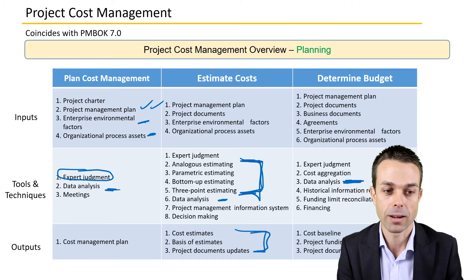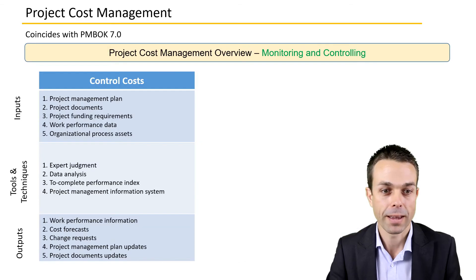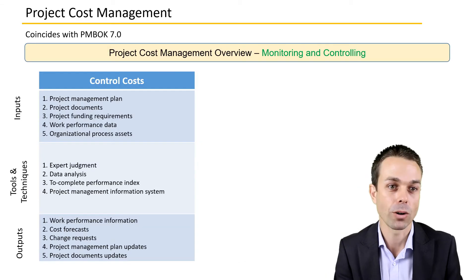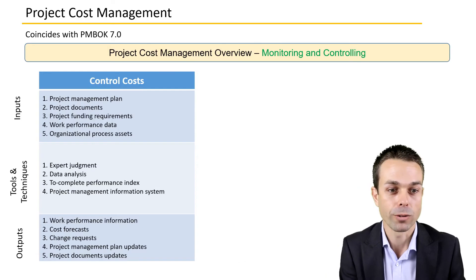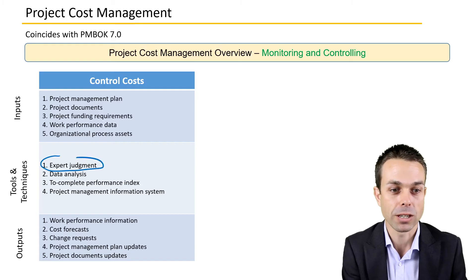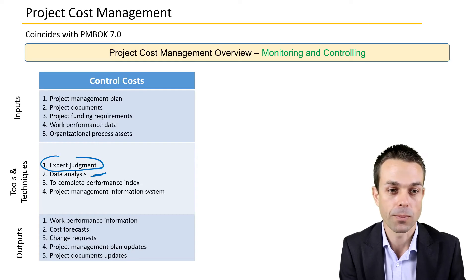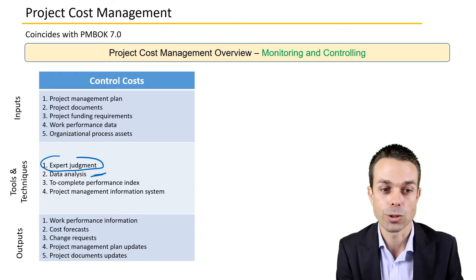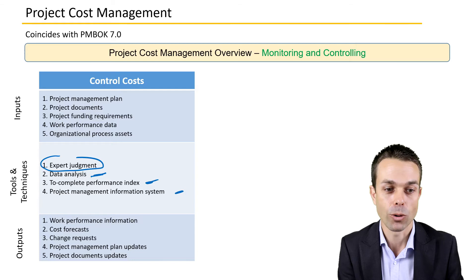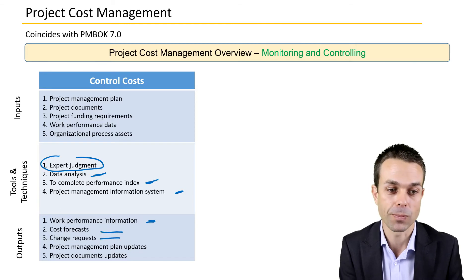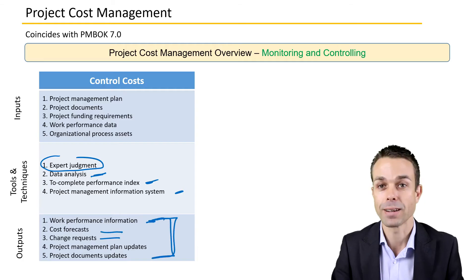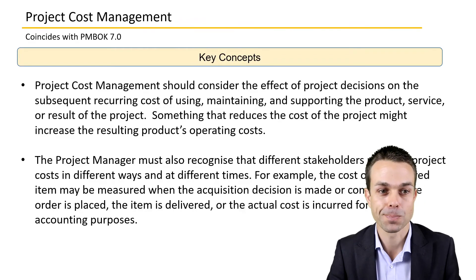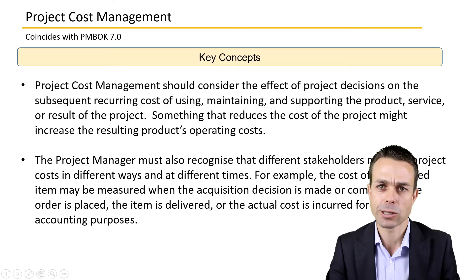For outputs, we've got estimates and baseline documents — our cost baseline. When controlling costs, we again have expert judgment and data analysis as big ones, along with the to-complete performance index, project management information system, and outputs including change requests, cost forecasts, and work performance information.